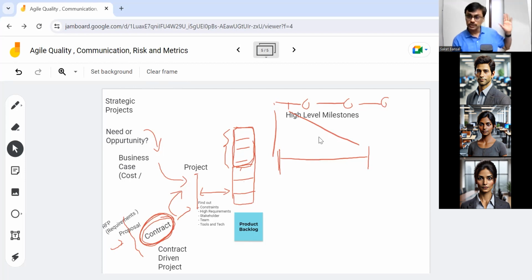We need to review it as per our baselines. So you are keeping your scope fixed, possibly, and you are only focusing on incremental delivery. And in incremental delivery, you are using all the approaches related to communication styles, daily stand-ups, reports, the Jira way of working from Agile. But that's your hybrid approach.